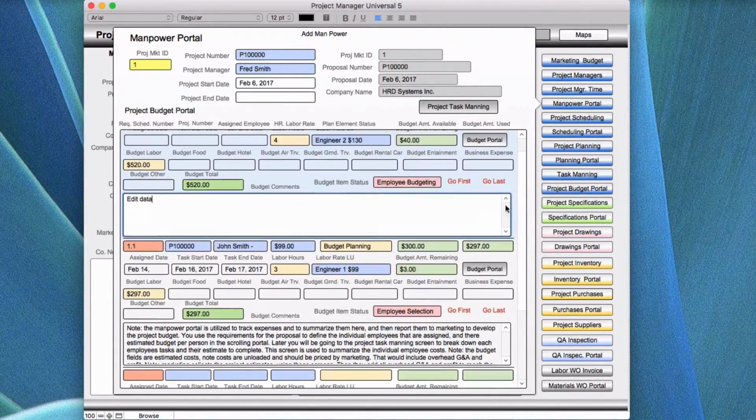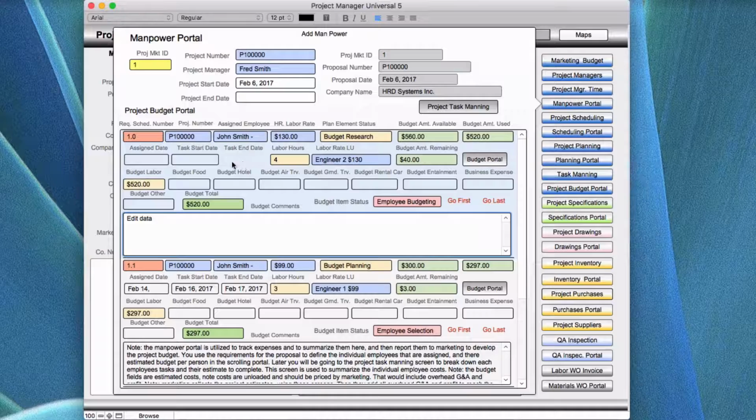If you're the guy that's doing the specifications, you're listed as the guy that's doing the specifications, and what is your cost to produce so many things from the specification, and how long it will take you to figure out the specification and produce whatever level specification that you have to build. Maybe it's an engineering thing, or electronics, or mechanical, or maybe services of some sort. Whatever it is, you have to identify that in a spec, especially if you're going to a vendor. If you're going to a vendor, you have to have a quote from the vendor. So those would be services that you'd have to identify and show that they are cost estimates that are included in these areas up here. Like other would be vendor expense. Maybe you had to bring something to a vendor where you had to ship it. There's all those kinds of things you have to consider when you're doing a project, including the timeline that it's taking to get done.